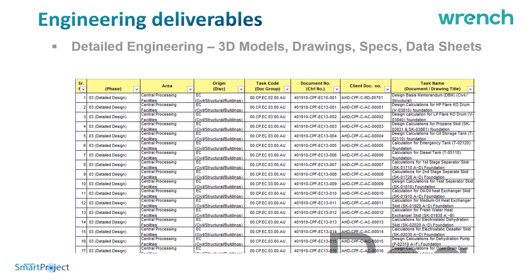The engineering workflow starts with the master deliverable list, which consists of deliverables that could be 3D models, drawings, specifications, data sheets, or method statements. These are either created as a list in Excel or in MS Project and can be imported as engineering deliverables into Smart Project.